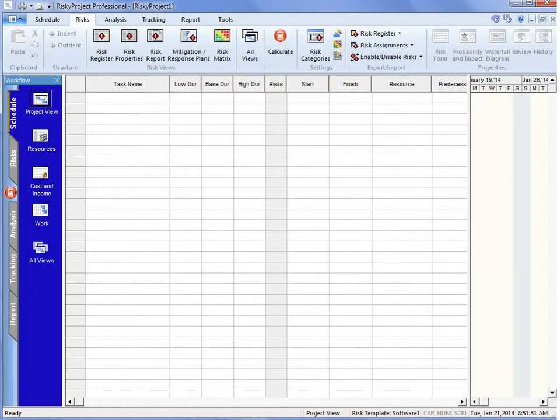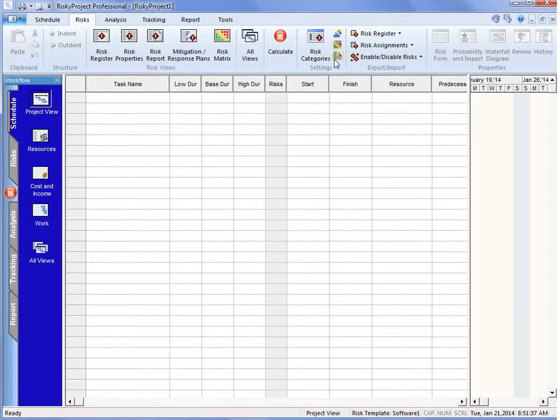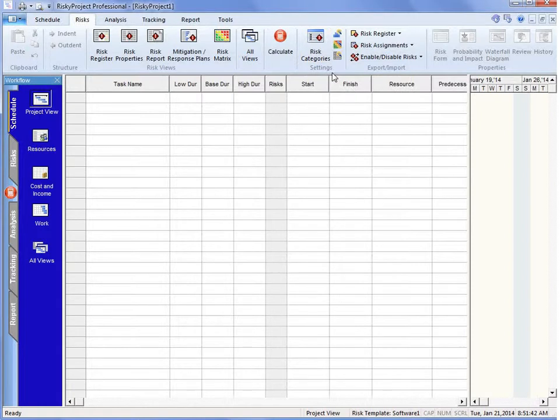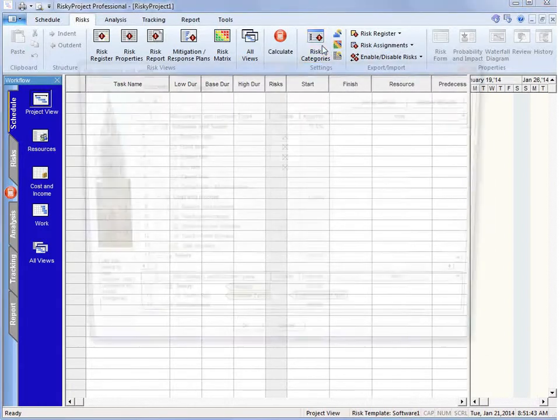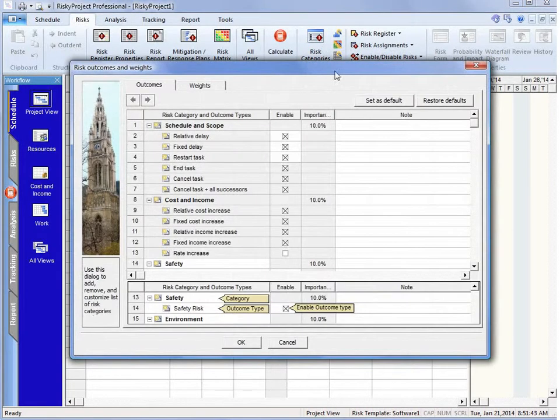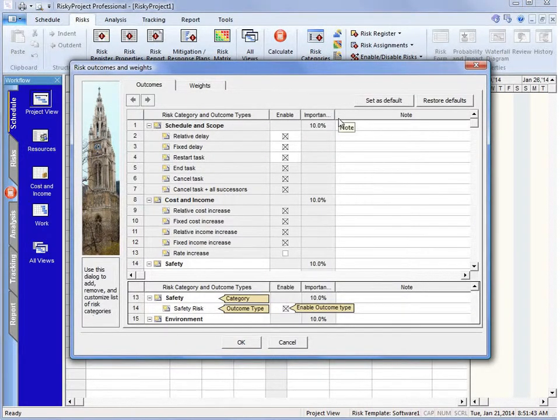So in Risky Project, to set up our risk categories, we go to the Risk tab and then go to the Risk Categories in the Settings group. This shows us all of our risk categories.